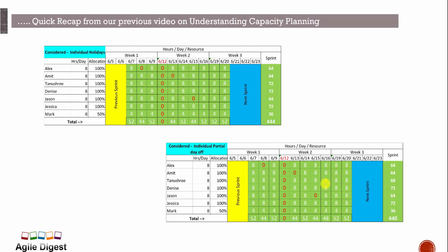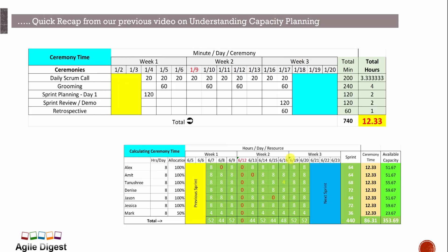The total sprint-wise capacity so far is calculated after factoring in team holidays, individual vacations, and half days. Now we look at ceremonies — the time spent within the sprint. Daily scrum call is 20 minutes every day. We are spending an hour on backlog grooming on certain dates — the 5th, 10th, 12th, and 17th. Sprint planning is on day one.